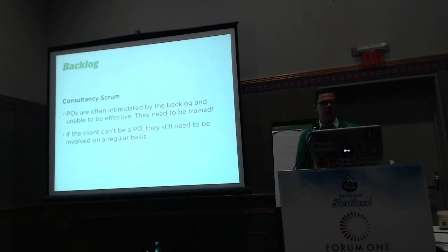They need to understand how something is considered done when it's only a piece of that project. So understanding how a story is written and how it is therefore done. And that's negotiation. There's nothing I can explain up here that would clarify that really, except that for every story, you want to be sure that you include a demo script and a definition of done, or that you have a definition of done that expands over the entire project. So they need to understand what done means. Done doesn't mean the website's completed. Done means this one teeny tiny piece of functionality has been completed in the past 2 weeks.